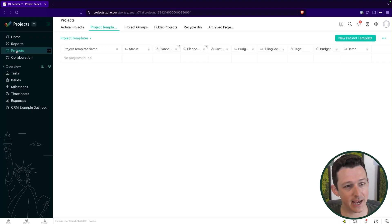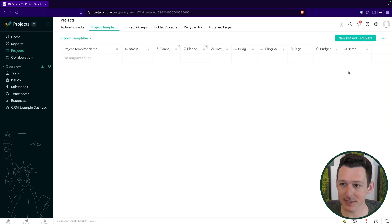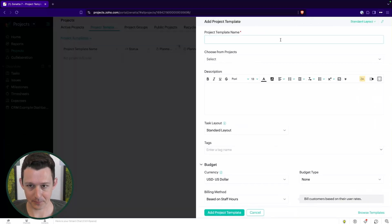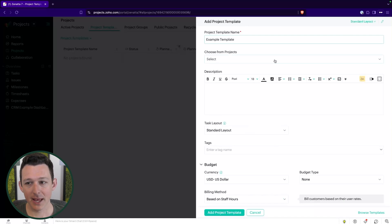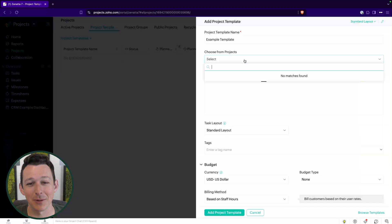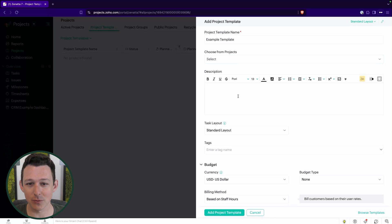So under the Projects tab and then under project templates, here is where we can create a new template. We're just going to call this our example template. Now, if you have some existing projects — let's say you did an implementation, you built the project from scratch and you're like, hey, that went great, let's turn that into a template — you can do that from the "choose from projects" option.